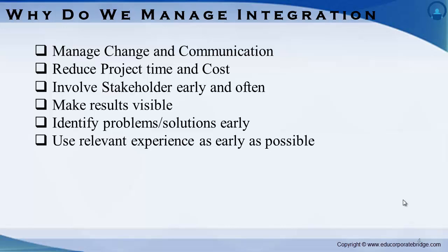Suppose we have a scenario where some changes have been requested by a customer in the middle of project execution. Being a project manager, will you go and just do the change in the system? The answer is no. You will do an impact analysis of the change, and write down the effects it will have on schedule, time, and cost.